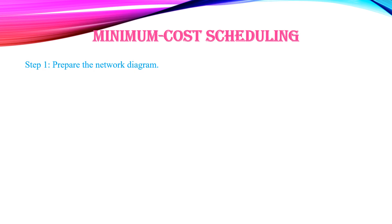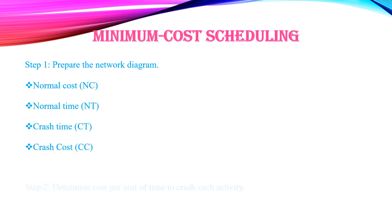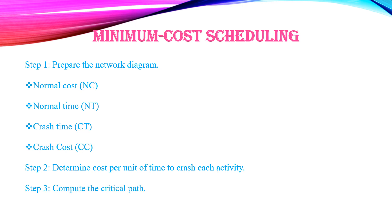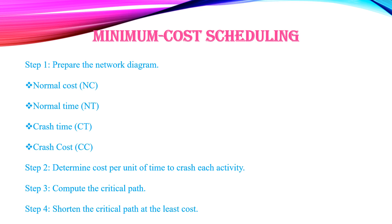For minimum cost scheduling: Step 1 — Prepare the network diagram with normal cost, normal time, crash time, and crash cost. Step 2 — Determine the cost per unit of time to crash each activity. Step 3 — Compute the critical path. Step 4 — Shorten the critical path at the least cost. This is the simple procedure adopted in project crashing or minimum cost scheduling.